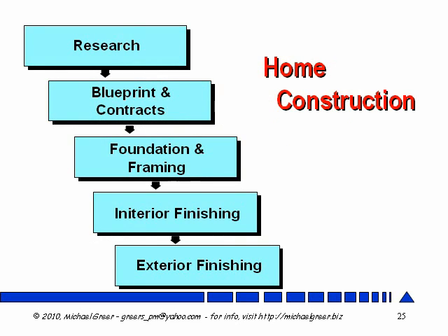of deliverables. So, for example, if you're building a house, you're going to have a blueprint phase before you begin foundation and framing and interior finishing. The blueprint not only guides the quality creation of the deliverables, but it gives everybody on the team, including the buyer, the opportunity to review exactly how the house is going to look before they purchase it and before costly work begins.